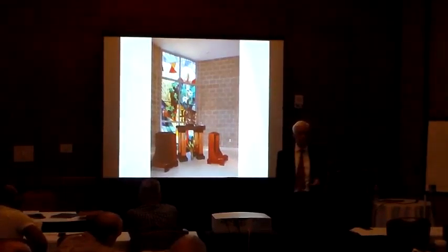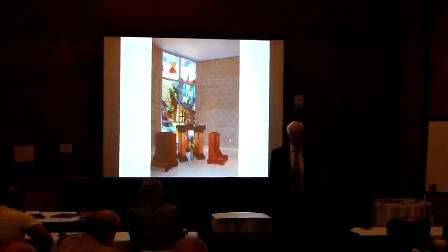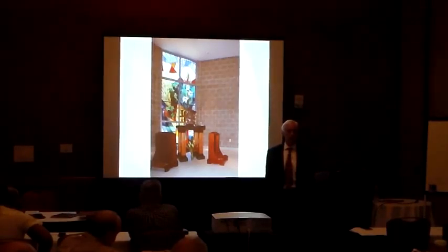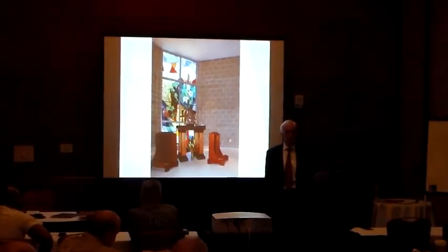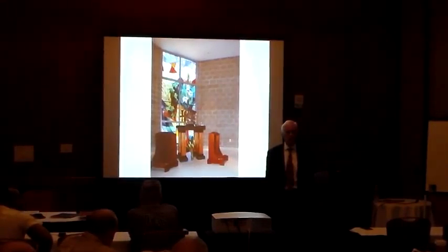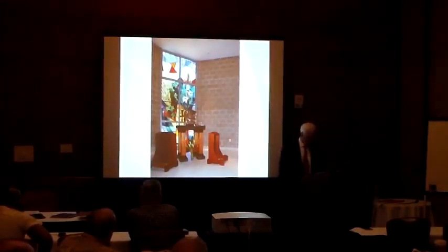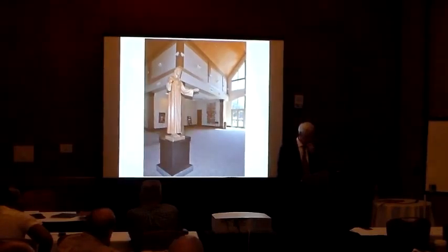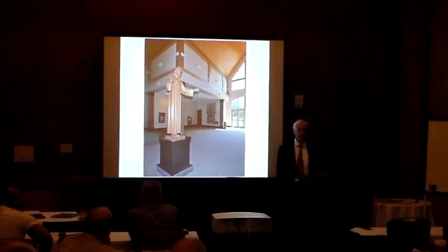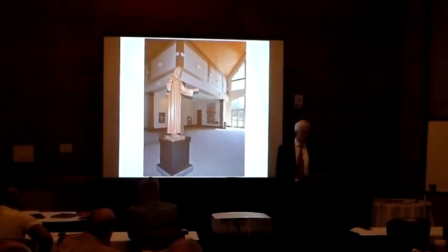And there's a way to structure your architectural contracts and your CMGC contracts so that if the parish is not gelling with the professional, you can get out pretty clean. If we're doing a standard CMGC or hard bid, we don't take architecture past schematic. So by that time, the parish has an idea if they're really liking this architect. We always hope they like the architect. We hope we're pre-qualifying the architect. And we always put in the AIA contracts that we own the intellectual property.